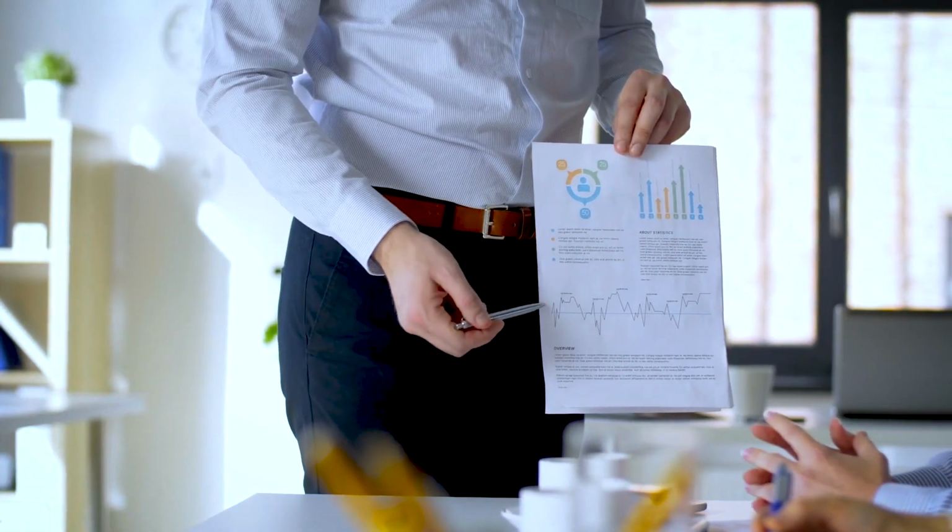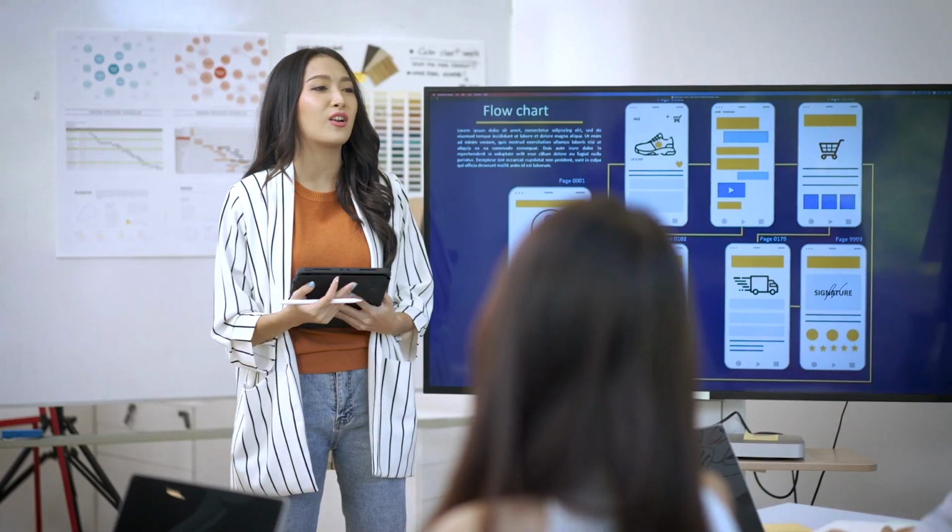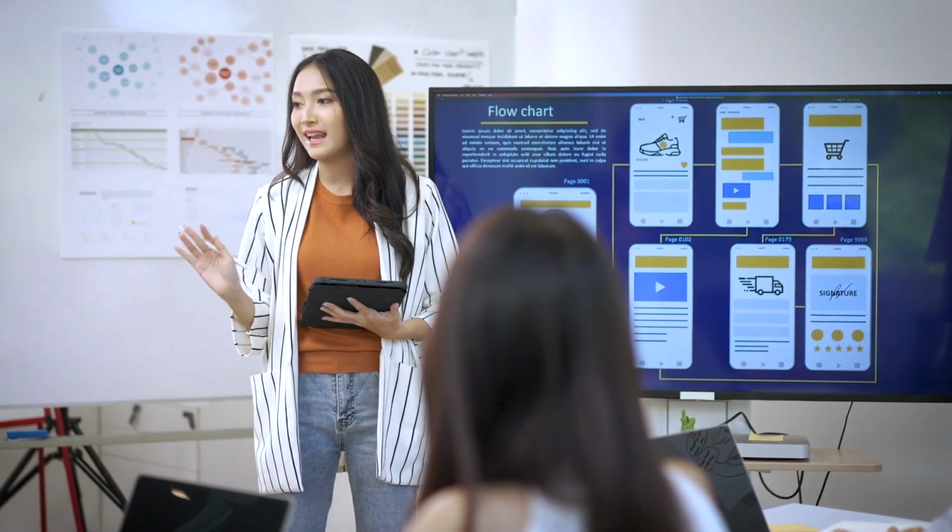To get to this point where we can fix the pricing though, we undertake a digital discovery session first to help understand the scope at a high level. We then provide a cost range to ensure the project will be financially viable. At that point, we go through an intensive ideation process designed to pull apart every feature of the project at the smallest level. And then we write requirements, draw up wireframes, define the sitemap, and a work breakdown structure. And this works really well as the investments are smaller to start with. And then when we do start the design and development process, everyone's really clear on what needs to be built. Our clients have a shopping list of detailed features which they can mark off when they're testing what is built.